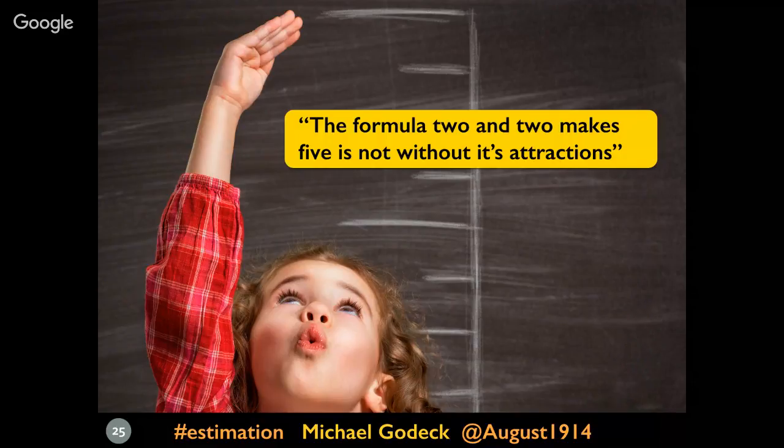Now, if you have a given team, one team that reports a velocity over 3 sprints of 22, 28, and 53 over 3 consecutive sprints, does that demonstrate or prove an increase in productivity? All right. If all the sprints are based the same, then it actually is kind of representative. But it's an interval scale, right? The idea is that you really shouldn't be trying to base the stories all the same. From a measurement perspective, it would be better if you didn't have to think about trying to base consistently, right? But you're forced to try to base consistently in order to try to achieve this downstream metric that's based on a math that's a little sloppy.